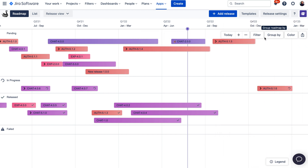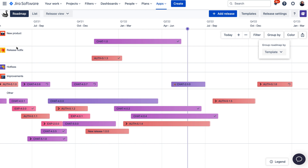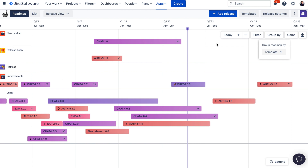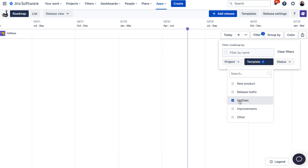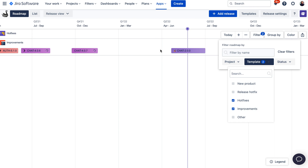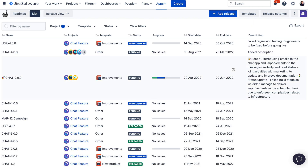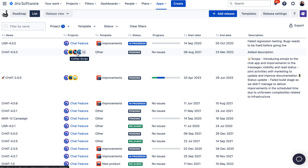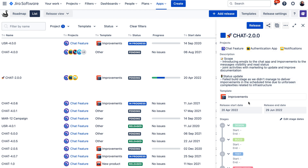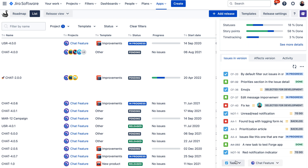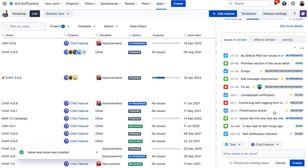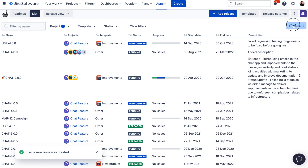Releases also have stages and templates available, similar to issue templates. You can use these templates to categorize your releases as hot fixes, new product launches, bug fixes, or improvement releases. You can create these templates in settings and also create stages with default duration to make it easier to schedule and plan. A good thing about using templates is that you can group your roadmap by template, seeing different types of releases as swim lanes and filtering by them. For example, if you need to know how many hot fixes or improvement releases you've done in the last year, you can easily visualize it. There is also an option to see releases in the list view to access and manage all releases from all imported projects in one place. You can export this view to get a CSV export of all your releases in Jira.